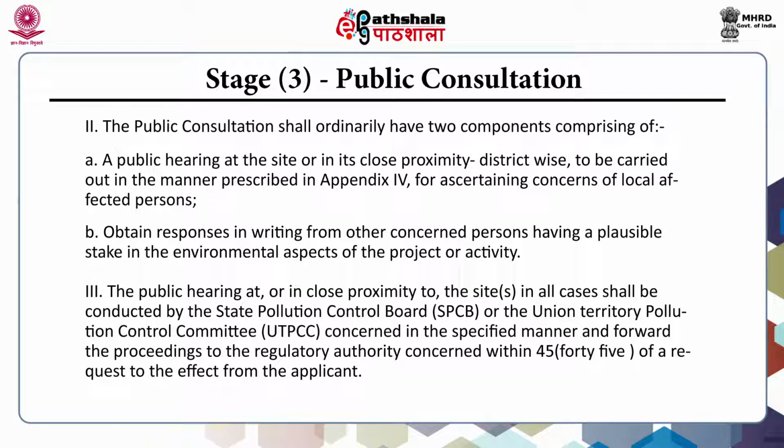The public hearing at or in close proximity to the site in all cases shall be conducted by the State Pollution Control Board or the Union Territory Pollution Control Committee concerned in the specified manner, and the proceedings forwarded to the regulatory authority concerned within 45 days of a request to the effect from the applicant.